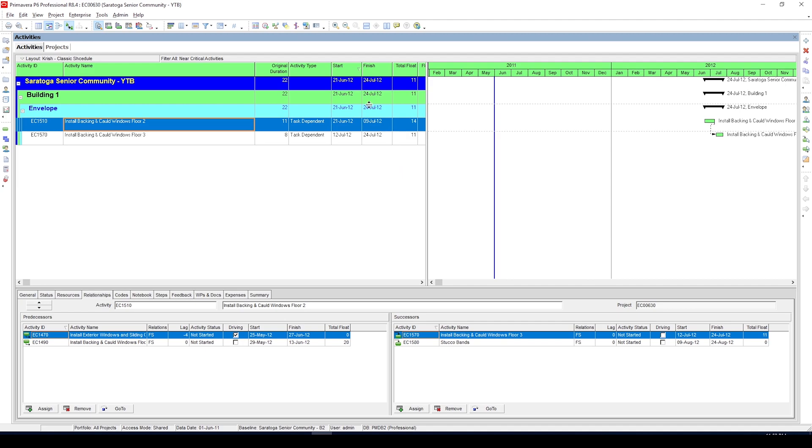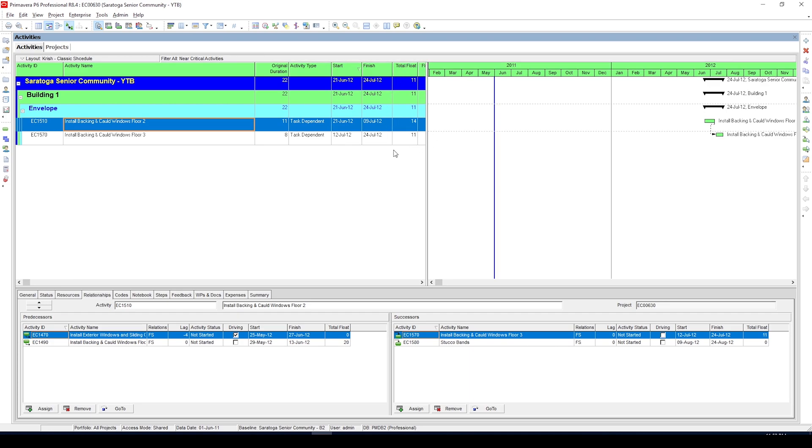However, the problem with this first method is it defines activities as critical based on the total float, which would have been fine for simple projects with no actuals or constraints. But if you have constraints or project deadlines in your schedule, those things will alter the total float of your schedule and you will not get correct critical or near critical activities using the method we just talked about.